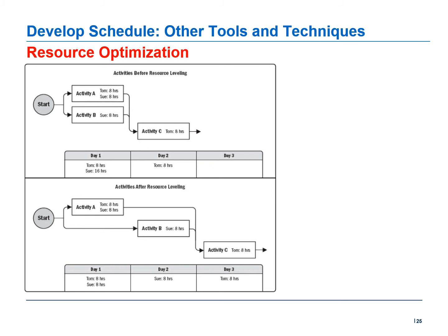In resource smoothing, as opposed to resource leveling, the project's critical path is not changed, and the completion date may not be delayed. In other words, activities may only be delayed within their free and total float. Resource smoothing may not be able to optimize all resources.